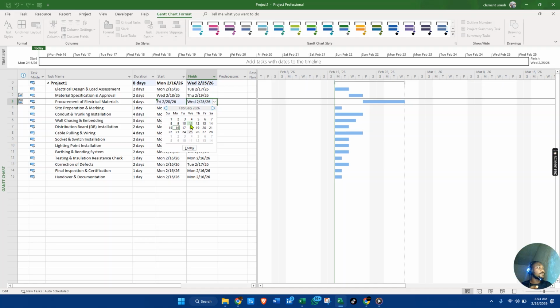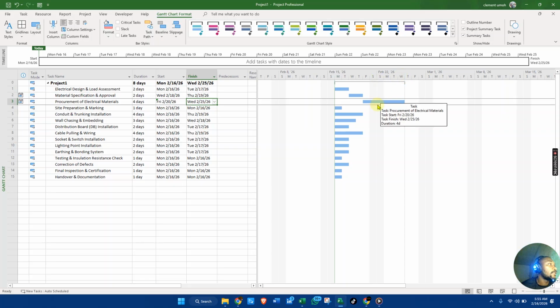We're not supposed to work over the weekend. Okay, yeah. When did it end? The 25th. So end on the 25th. If you look at this particular Gantt chart, this is Friday, 1, 2, 3, 4. That means Friday, Monday, Tuesday, and Wednesday. That is the 4 days we're going to work. The Gantt chart does not recognize the weekends. That is why here is shaded light gray. You understand? Saturday, Sunday, Saturday, Sunday, Saturday, Sunday. So basically, the Gantt chart works with a standard time.